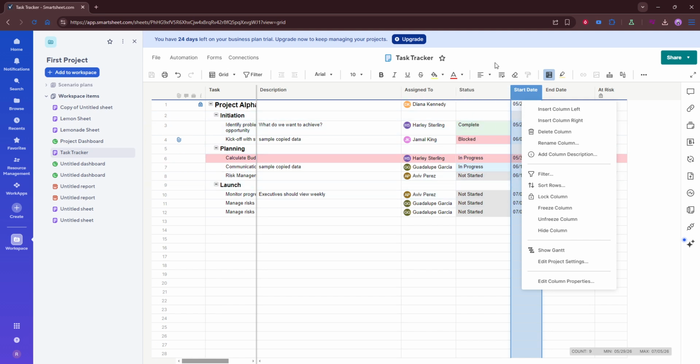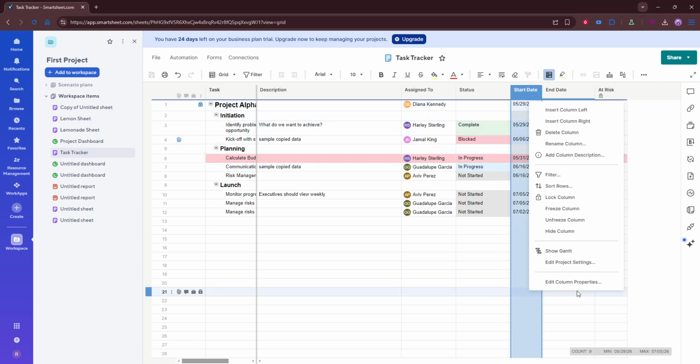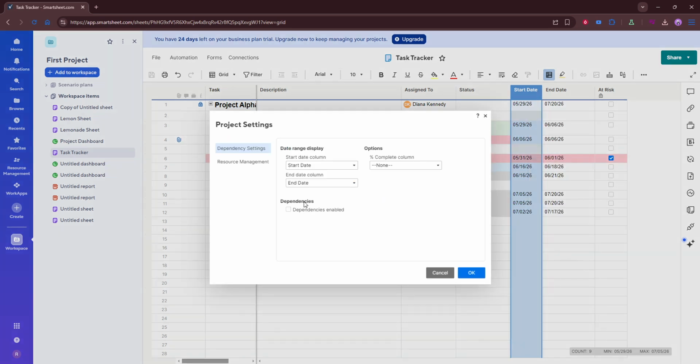Once that looks good, review any predecessors connected to the tasks. Predecessors control how one task affects another, so an incorrect predecessor can easily create duration problems or scheduling conflicts. Look for anything that seems inconsistent, such as tasks linked in the wrong order or relationships that don't match the intended workflow. If you notice invalid dates or dependency errors, go ahead and correct them.